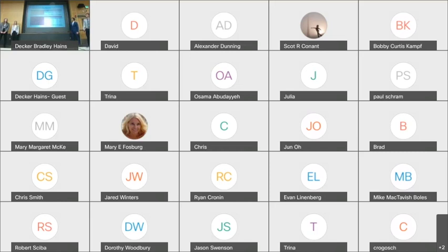My two cost groups to discuss are the earthwork and miscellaneous cost estimations. The earthwork estimation came through the initial cost to stake and clear brush off the site, as well as the cost to excavate those ponds. The miscellaneous cost estimate covers all of our costs for the road signs on site, the fence around our retention pond, as well as 4 different types of trees following the local ordinance. You'll see the public cost comes out a little higher than the private cost, and that was due to the more trees being required on that layout with different parcels there.